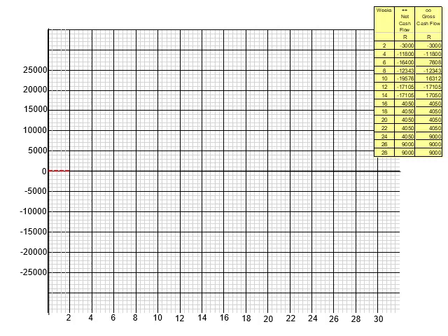Let us continue. At week 2, according to the budget worksheet, the cash flow is negative by 3,000 Rand for both the gross and net cash columns. So, draw a solid red line, in a negative direction on the vertical scale, up to minus 3,000 Rand. Record the amount at this position. The reason why the line is red and solid is because we use it to indicate that a negative cash activity is taking place.